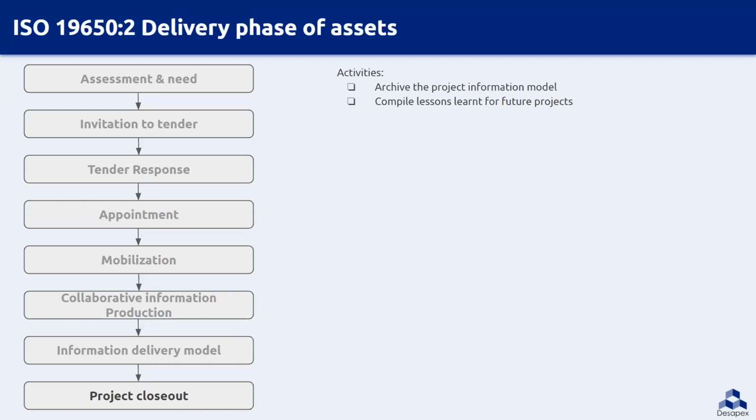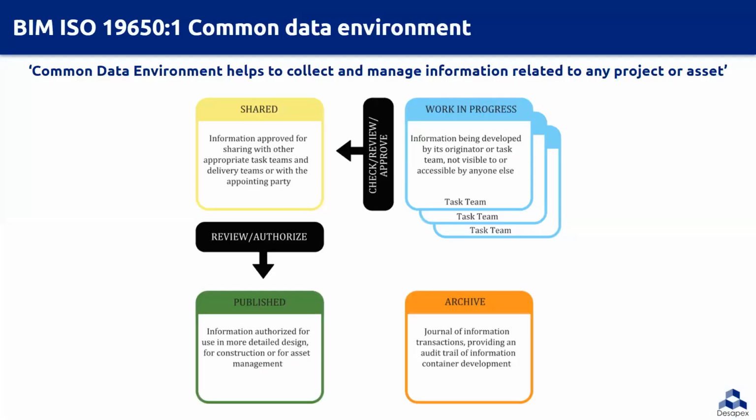With all the above procedures, we are generating a lot of documents and information, which have to be properly documented. So how do we digitally manage all the information? BIM ISO 19650 supports the management of all the produced information in a unified manner. The common data environment, or CDE, translates the need for storage of information at a container level, like work in progress, shared, published, and archived. These containers help for information development, review, approval, and authorization of information created during the delivery phase of the project.